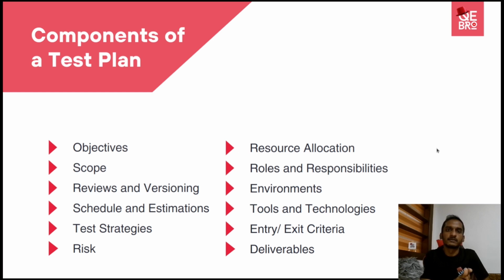Then based on the number of reported issues, we can have defect severity metrics. Likewise, there can be different metrics involved here, and based on those stats we can decide our exit criteria. No blocker or criticals open. Likewise, so those are the entry and exit criteria. So this is also very important when you need to make a decision at the end to release or not.